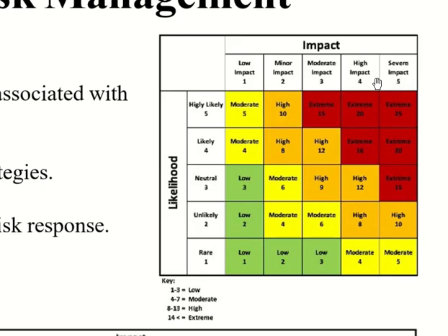Relative impact. If the impact is very high, we are not saying the impact will be 1000 BD or 2 days of delay. No, is it high or low? So relative terms, subjective, not exact quantities. We don't want quantities here. In both cases, likelihood and impact, we're not talking about quantities.